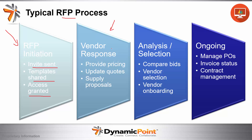After that comes the vendor response. In this step they're going to provide pricing, maybe update quotes — it really depends on the data I want to collect. They may supply proposals. All of these vary based on the type of business you are in and what is necessary from the vendors involved in this RFP process. After I gather their data, I'll move on to analysis — maybe I want to compare bids, do a vendor selection, and then after I select them, do an onboarding process.